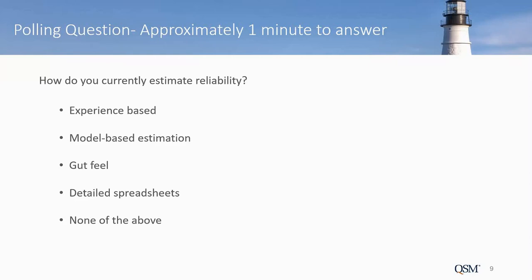The other thing we recommend is to do the reliability estimates alongside the cost and schedule, since the reliability estimate can validate or sanity check what you might be seeing with the cost and schedule numbers. Or if someone gives you a cost estimate that's unrealistic, the reliability estimate might show that the cost estimate is not feasible. It can give you a red flag early so you can make a better decision.